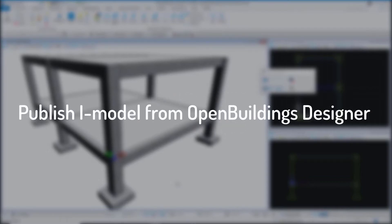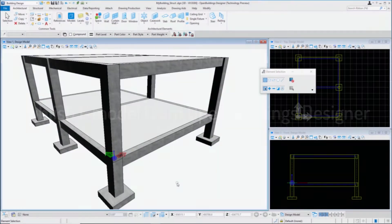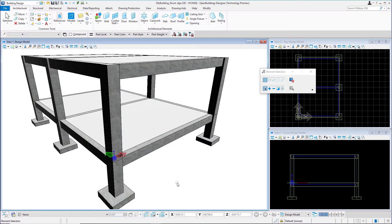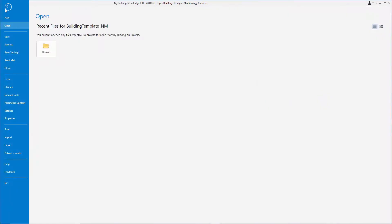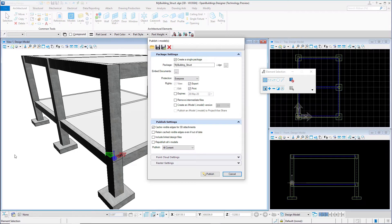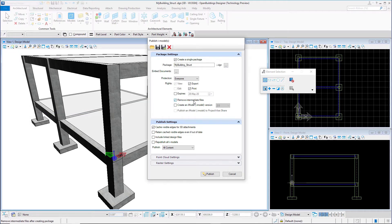We are going to start by exporting an iModel from Open Buildings Designer. An iModel is a container of BIM information along with a 3D model. To export an iModel, we first open the model in Open Buildings and then go to Files, then Publish iModel. We select a location for the exported iModel, turn on the following options, and finally Publish iModel.